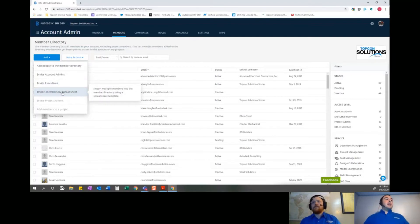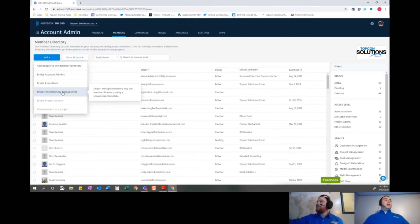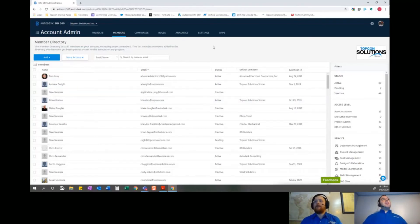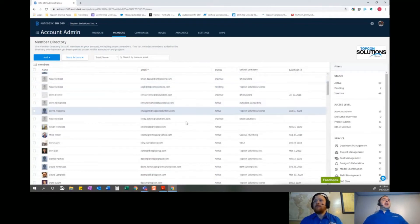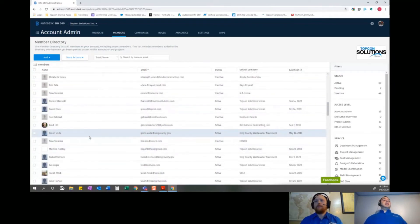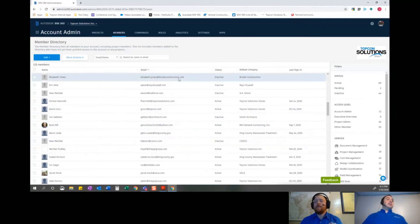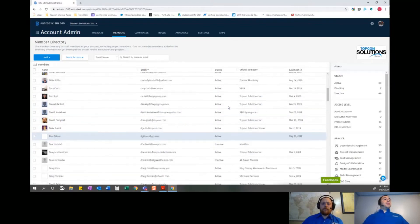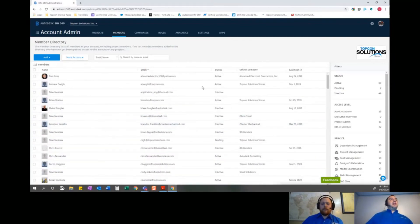If you have an existing database or repository for contacts — maybe you're using bid tracking software that has all your contacts already — this is a great tool to customize some Excel spreadsheets and do a quick import. It's especially useful if you've got 100, 200, 300, or even 2,000 people to invite. It's important to note that this member directory is not actually taking up a license. You can invite 10,000 people into this database, but they don't get assigned a license until you add them into a project.